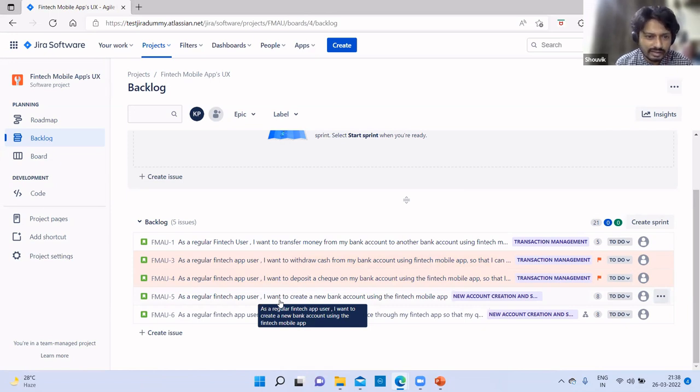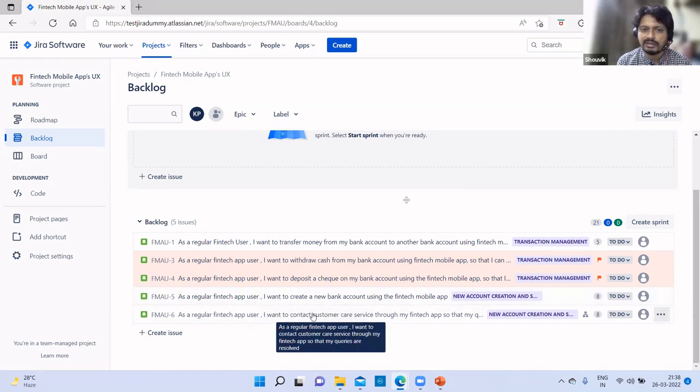Yeah, sounds good. Then the next one, FMAU 5. We have already taken out one of the acceptance criteria, the video implementation, so we'll create a separate user story for that. As discussed, I'll talk to the people from the Center of Excellence team and find a point of contact who can come and guide us and help us with whatever they have implemented so far. We can discuss that new user story in the next refinement if possible. Kirti, you can decide the priority of that. Taking that out, the team has estimated this user story as 8. So this is good to be taken up in the coming sprints.